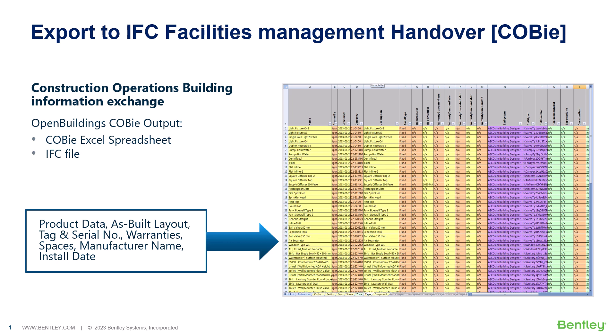Together with an IFC model, we are able to export the standard COBI spreadsheet that contains SBIL information for facilities management and handover. It contains product data like materials, spatial assignment, manufacturer name, IDs, and other properties as per requirement.